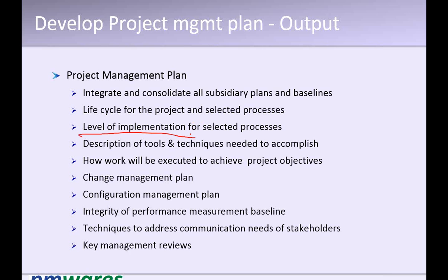In a small project, the requirement management plan and the scope management plan may merge and become one plan. Say the scope management plan contains requirements as well as scope, or the requirement management plan contains scope and requirements both. So not necessarily are they different.